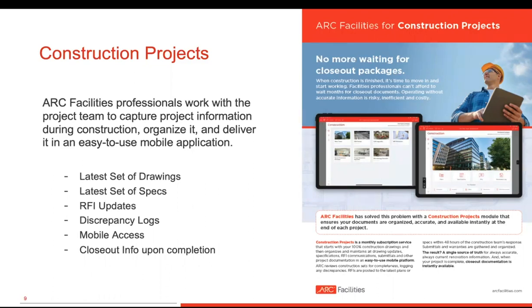And the reason for that was the design construction team had not accounted for the fact that somebody has to change the filters in that giant vacuum and you can't squeeze them in the side. So that lack of communication resulted in the facilities team having to go and carve up a brand new building. So hopefully with some visibility, we can avoid mistakes like that, those kinds of costly things.